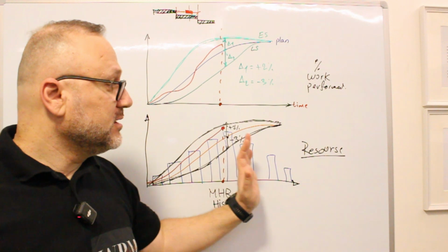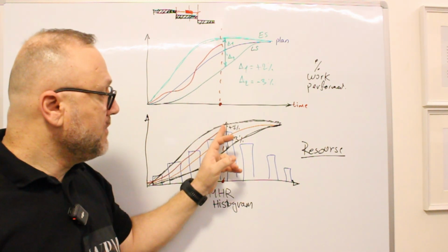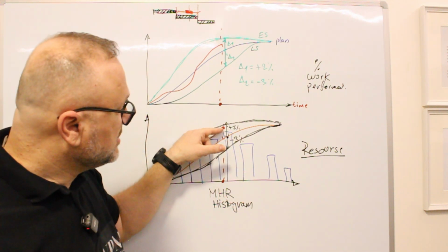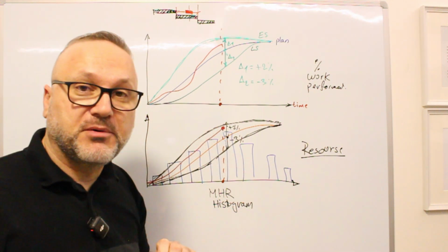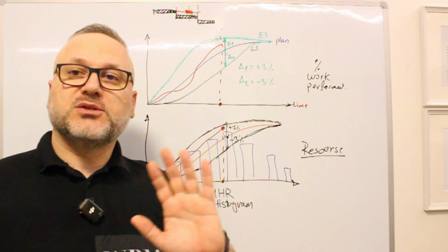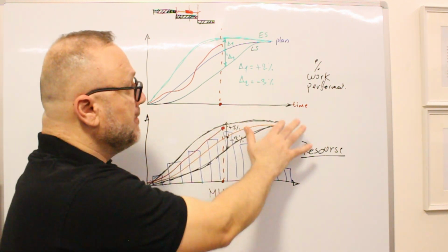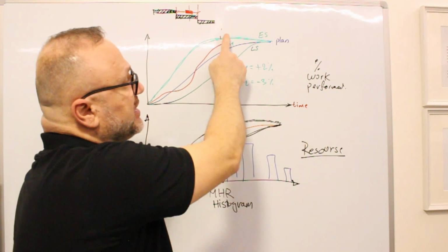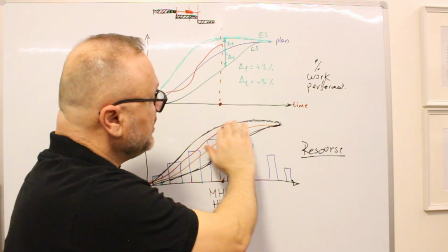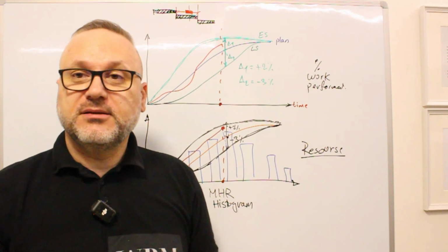You are actually doing good here, but he is expecting to pay less, and he will not pay you these extra hours you spend, but only the orange curve, only the plan. So you tell him, no, this is the deviation accepted based on the deviation of earliest start and latest start, and then you are okay with it, and you are reaching your plan on date.